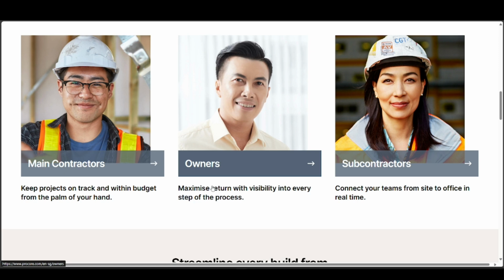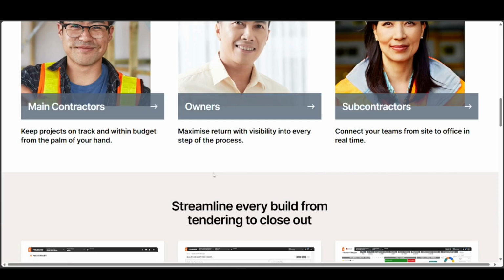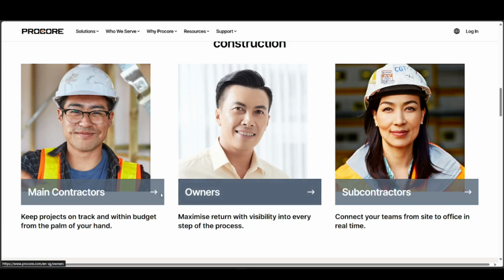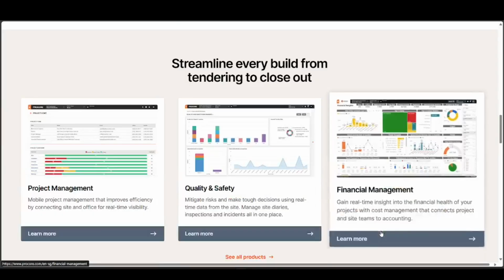So use the submittals log to see statuses, so open, in review, approved, rejected, or revise and resubmit. You can filter and export logs to keep stakeholders updated, and then once approved, Procore lets you distribute the final document to subcontractors or field teams. This ensures everyone builds according to approved specs, and that is for distributing approved submittals.